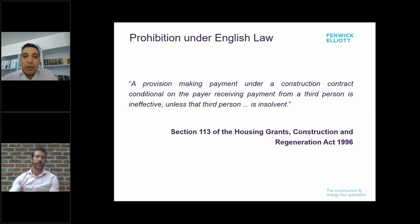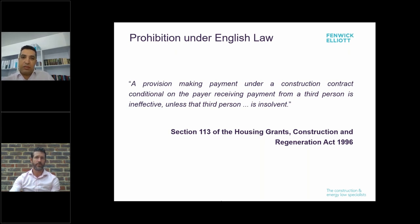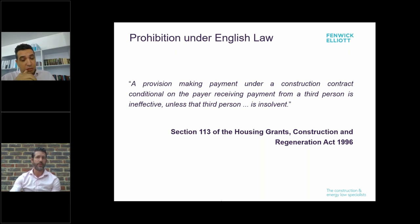Under English law, pay-when-paid provisions are dealt with as part of the Housing Grants, Construction and Regeneration Act 1996, which introduced wide-ranging changes to how payment provisions in construction contracts are governed. Payment provisions are dealt with under sections 109 to 113 of the Construction Act, with pay-when-paid provisions dealt with under section 113. The provision is pretty straightforward: section 113 states that a provision making payment under a construction contract conditional on the payer receiving payment from a third person is ineffective unless that third person is insolvent.